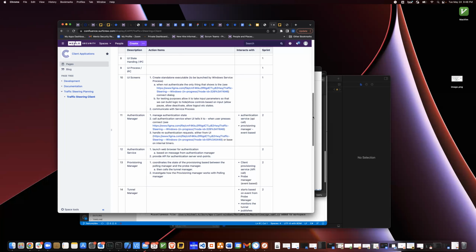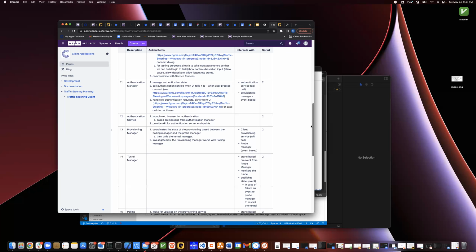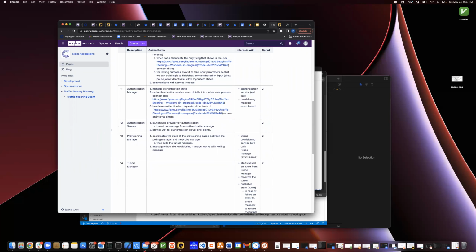So I mean, I think that has been made clear by MCC. The only way to solve the tamper proofing was to have 2 different processes. So yes, we should evaluate. I understand there could be an impact to the time schedule. So we should review this, and if we need to update the schedule, that's something we have to do. I'll do that once we go through this and scope each item.